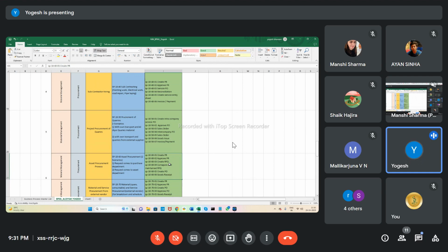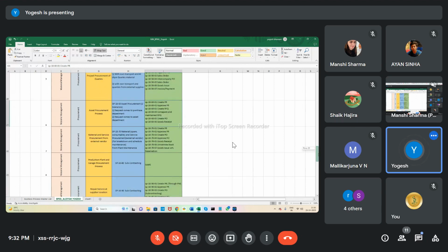because that has to be sent, standard process. If there is already a system material request, the asset department will convert the asset request to purchase advice. And if there is no system material request, the asset department has to create a material request and convert it to purchase advice. The PR is again sent back to the purchase department. The purchase department creates PO against the asset request, and after receiving, the asset code is generated, and then the goods receipt is done. So that is scenario one.